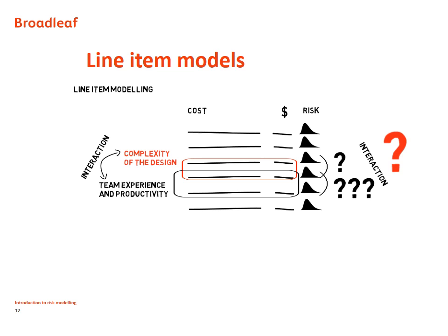There are other problems with this sort of modelling as well. What usually happens is that correlations become fudge factors used to adjust the results till the answer looks right. There's no problem with adjusting a model to reconcile it with other sources of information about the project, such as experience and judgment. But if you can't explain why a certain number makes sense, it becomes little more than a way to dress up that judgment and make it look more impressive by linking it to a model.